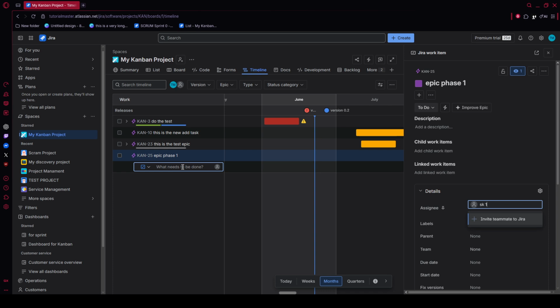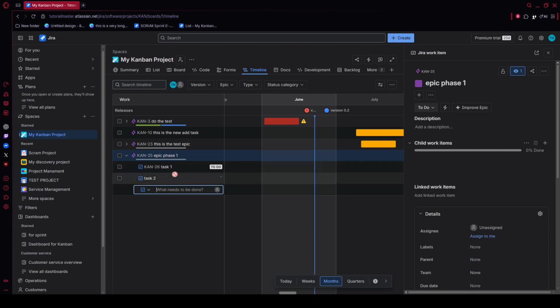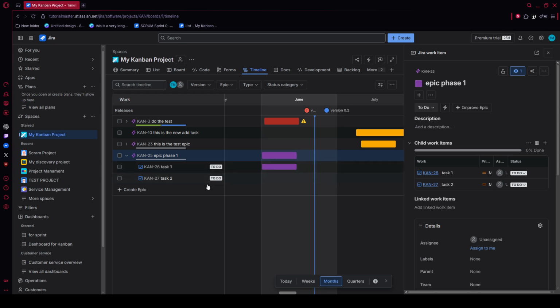After that, assign dates to each phase. On the timeline grid, click and drag across the calendar cells next to each phase to set its start and end dates. Do this in order so the phases appear sequentially from top to bottom. Jira will automatically create timeline bars and store the corresponding date fields for each item.